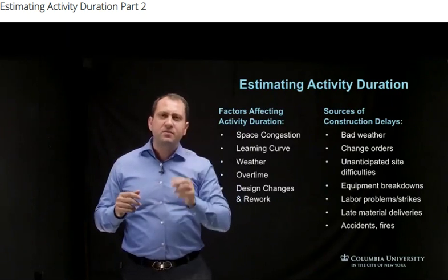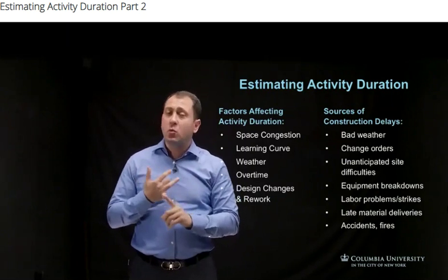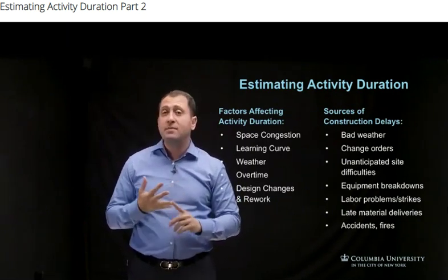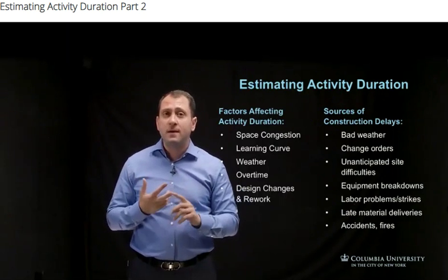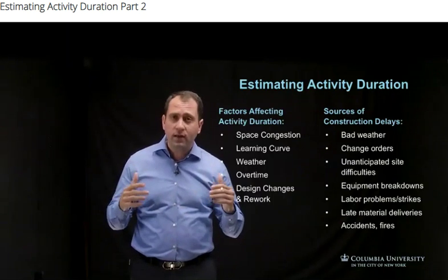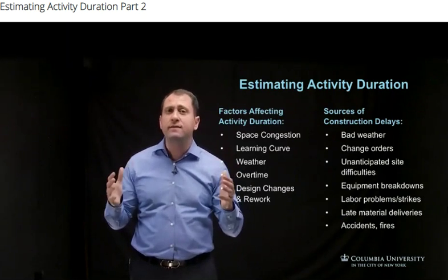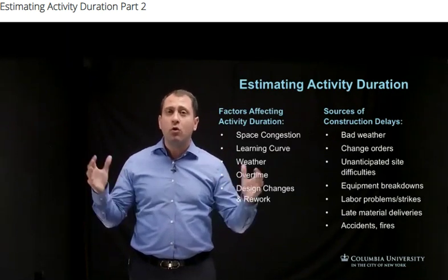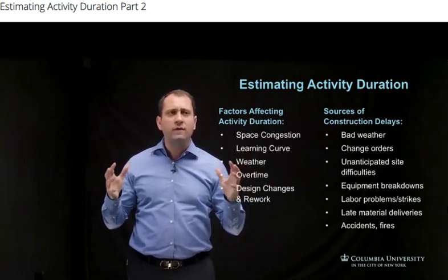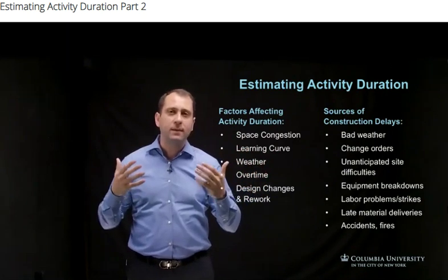Some examples of such conditions would be unanticipated groundwater or quicksand. An example I faced myself is the type of rock formations, where while you are doing the excavation all of a sudden you experience excessive quantities of rocks or a huge rock that you have to deal with. So this is what we refer to as unforeseen site conditions.